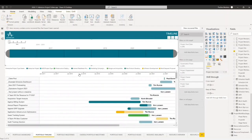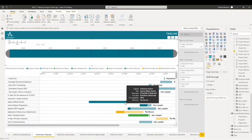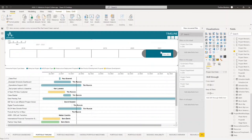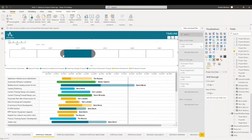Our project timeline is an interactive timeline of projects in a portfolio with their planned start date, finish dates, as well as completion data. The portfolio timeline shows visually where all the projects fall on a timeline, including their duration and progress. Projects are colored by project manager, and the tooltip on each bar in the timeline shows additional details. If you hover over, you would be able to see the name of the project, the task, start date, and the completion and resource. It is pretty interactive — if I click on 2021, it would only show me the projects in 2021, and so on.